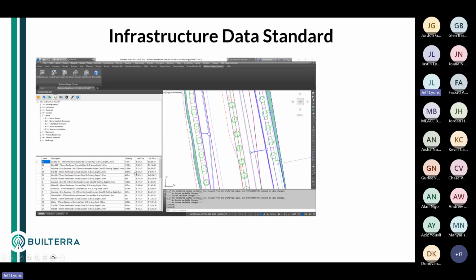So all of this pricing comes from your organization's database. So if you have 2 years of pricing and you can uniquely identify those items, we can add those 2 years of pricing and then start doing some estimates based on maybe just item code or even design properties. And we'll talk about that in a second.